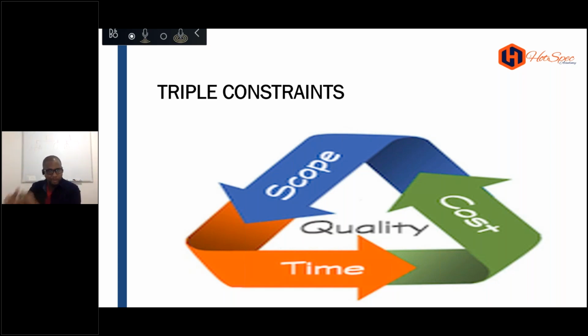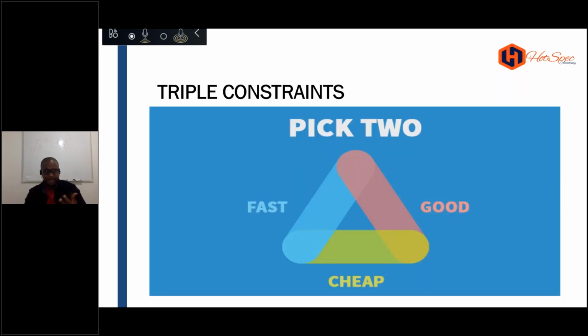You don't want to miss out on the budget, your time, your deliverables and your deliverable date. But those dates can move because they have tolerances. They're going to give you tolerance on budget; try to keep it within the tolerance. They're going to give you tolerance on time; try to keep it within the tolerance. But quality, nobody's going to ask you to jeopardize that, and please don't do that as a PM. So you can work on 3 constraints.